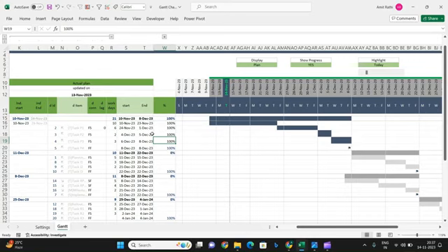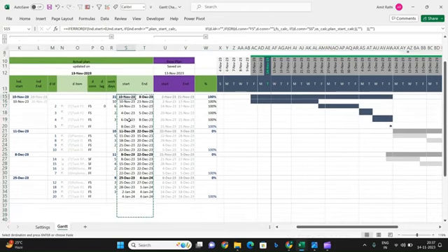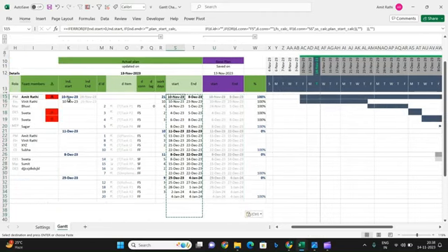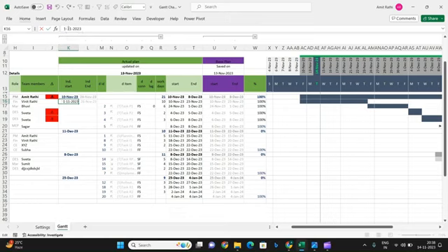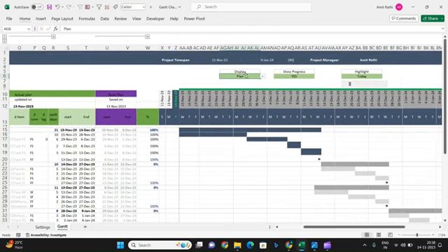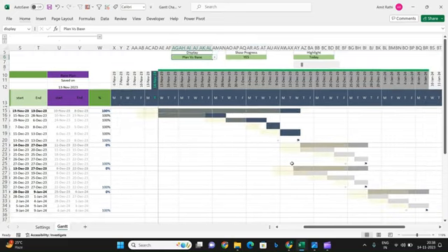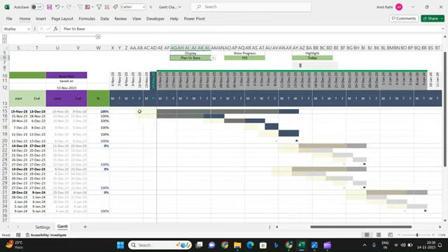Apart from this, say we have revisions within our task, we can change. Say I have this base, and my project has shifted somewhere, say 15. So the project will move, but at the same time you can see how it varies from my base plan. So you will have a clear picture, like the overlapping area is where the plan should have started, but it's delayed by 2 or 3 days, so I can move back.